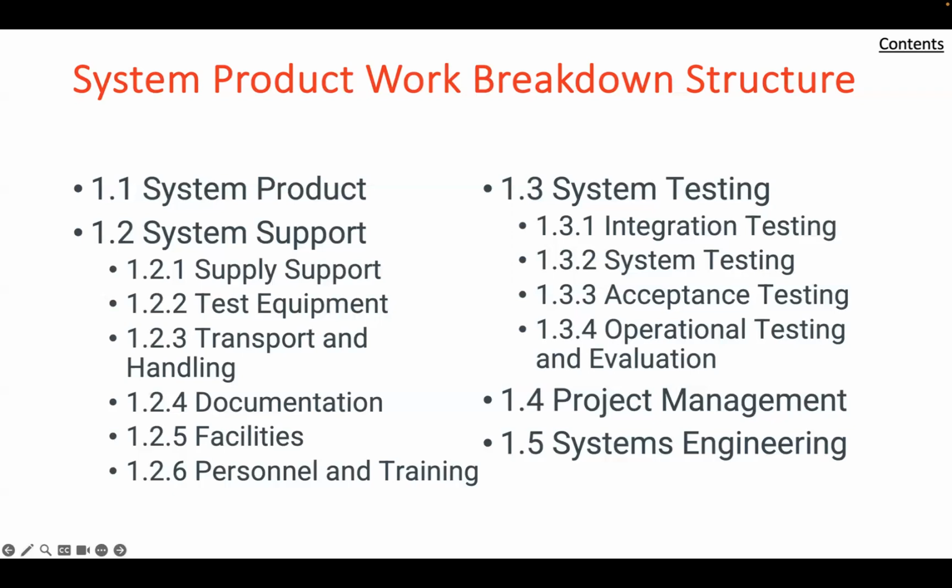There's also the critical path method. Network scheduling techniques are often used in project management to aid in planning and control of the project. Networks are composed of events and activities needed to carry out the project. Events are equivalent to a milestone indicating when an activity starts and finishes. Activities represent the element of the work or task, usually derived from the WBS, that needs to be accomplished.